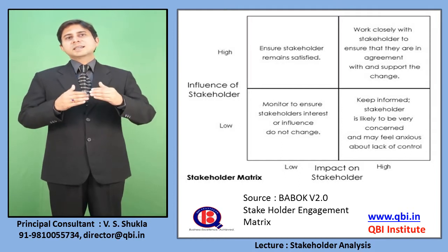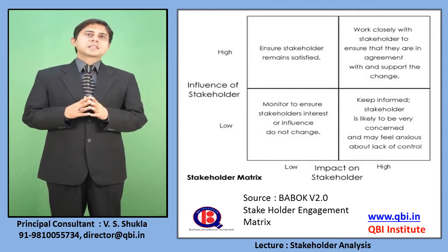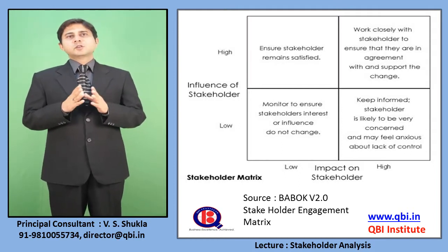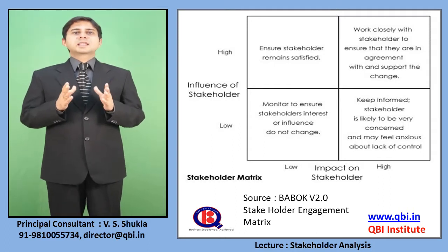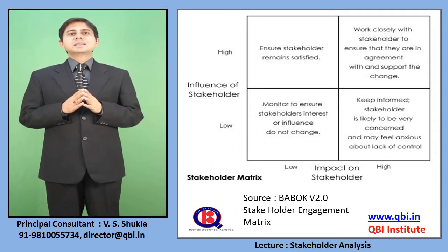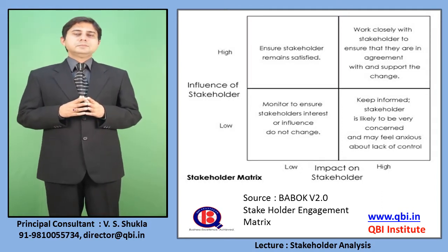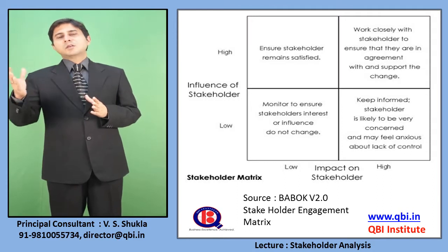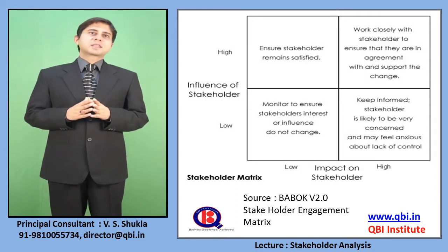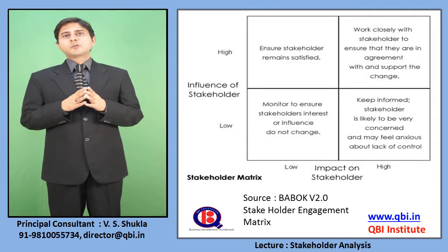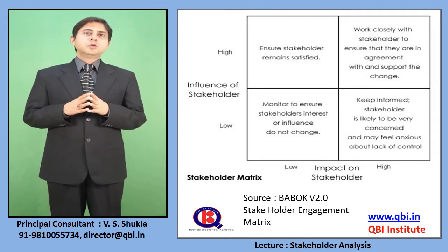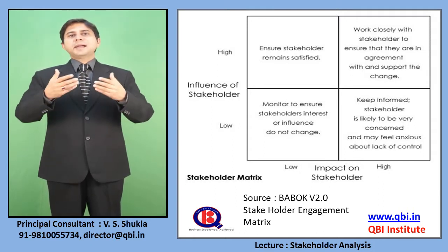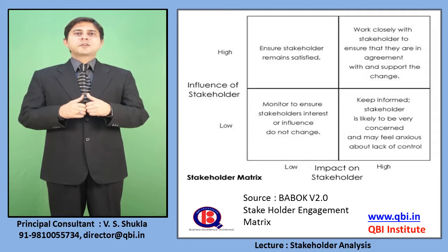So to engage a stakeholder like this, we need to ensure that the stakeholder remains satisfied. He is, or rather you are, in his good books. Another stakeholder on the top right can be someone who has high influence and has a high impact on him for the project.